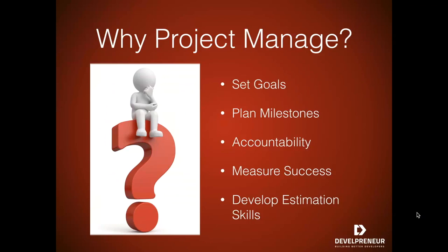If you're focused from a sort of project management point of view, it does push you to create milestones. I talked about having like a version 1 release. Well, along the way, it helps to have some key markers, key milestones of things that you have accomplished, of goals that you want to reach, little goals along the way to get you to that full application. And it may be stuff like, let's say it's a website, it may be just a login screen and a user registration, and maybe a home page or a dashboard kind of page, adding some reports, database connectivity, things like that. They're all very good milestones to just help you keep your thoughts straight as far as the tasks and the work that you're doing.